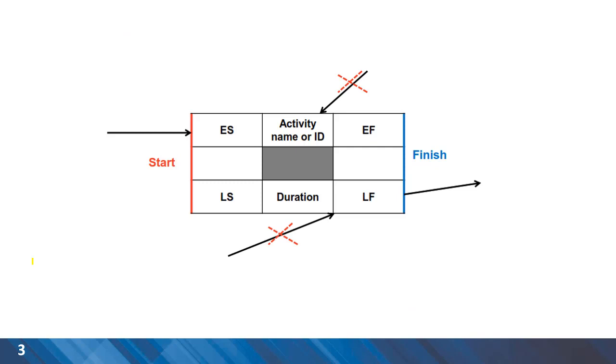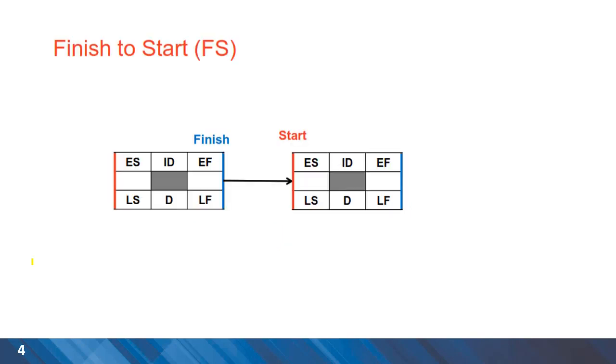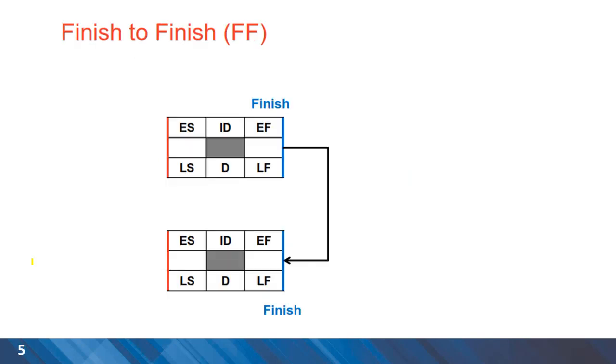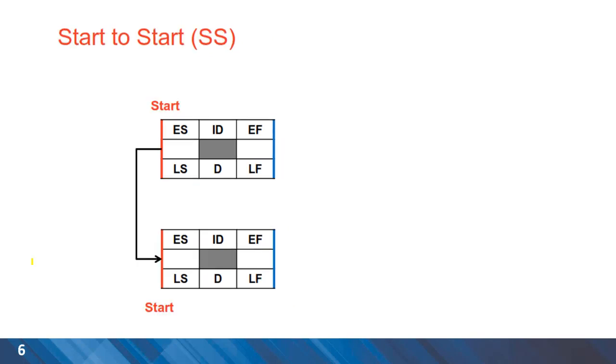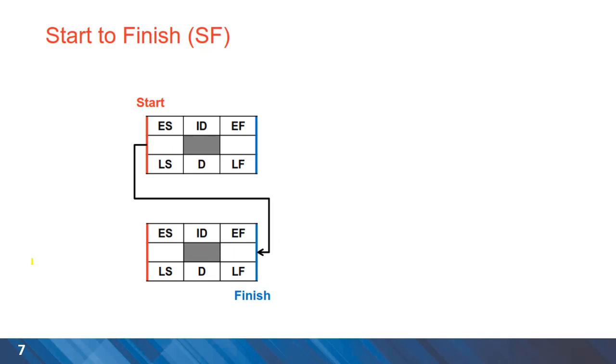Best practice in showing activity blocks: we need to connect activity blocks on the start side or left side of the block and finish side or the right hand side. Again, finish-to-start, best practice for visualization, finish-to-finish, start-to-start, and start-to-finish.